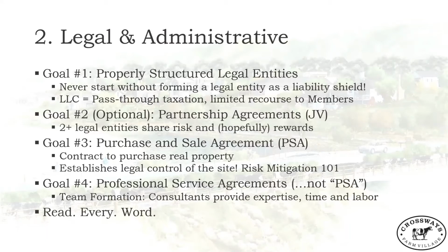The last thing that you're going to do, your last goal, is executing professional service agreements with all your team members. This is where, as a land developer, I'm going to hire my civil engineer. I'm going to start hiring my architect, my landscape architect, my planners, whoever I'm going to work with, all my attorneys, things of that nature.